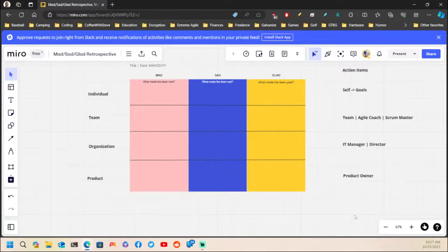And it's just a way of really focusing the attention on the specific categories of where you're upset, happy, mad, right? Or again, the four L's: liked, learned, longed for, and lacked, right? Or whatever, start, stop, continue. It doesn't really matter which format you're using, but just adding these layers of categories or domains of where you're thinking can really help you focus your attention on specifically what it is that you're not happy about, right? It just gives them a little bit of mental focus, but at the same time allows us to go back and look at the action items.